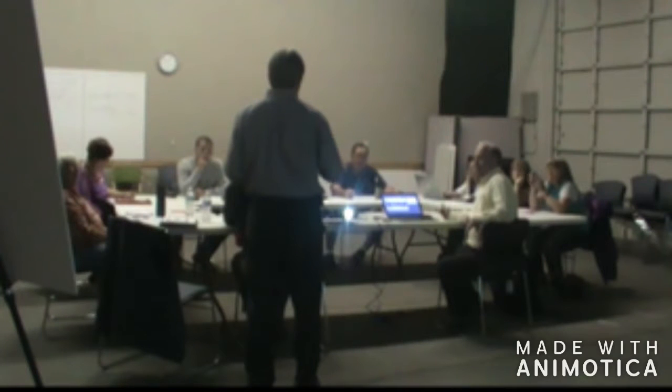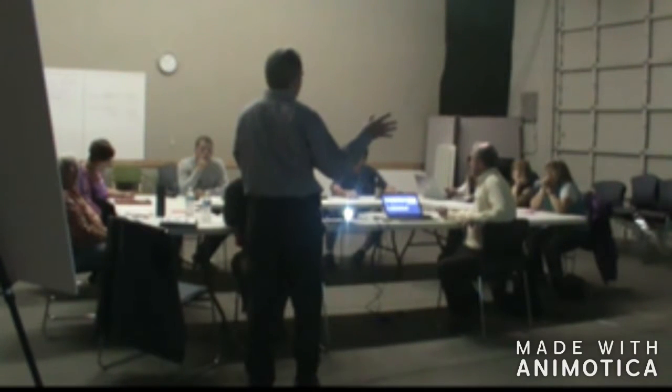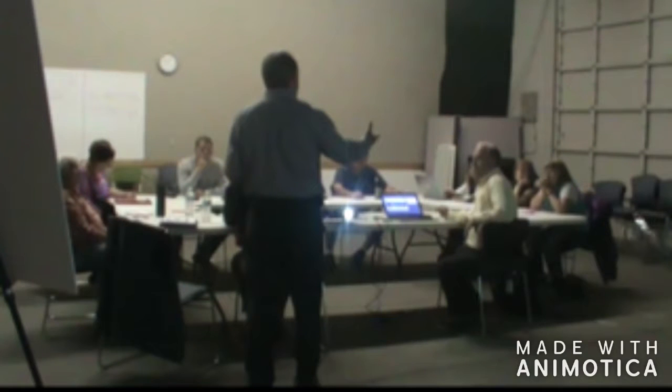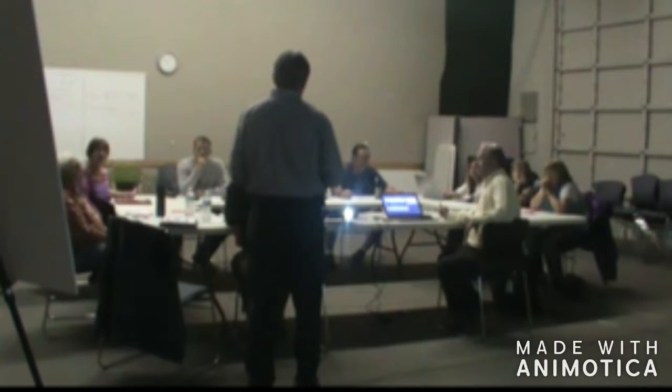This phase usually takes us about 4 to 6 weeks to move through, so it'll probably be a couple of meetings with you. We'll present some stuff to you, get your feedback, and then set up another meeting in another few weeks where we actually modify the design based on the output of what we discussed today. So with that being said, I'm going to turn it over to Doug. We'll go through the pool stuff first, get a handle on all that's encompassed with the pools, and then we'll talk about the other spaces after we're done with Doug.